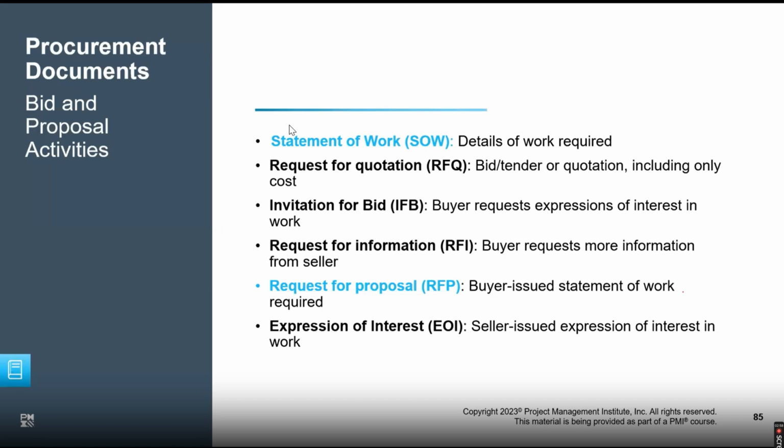MOU is to agree about the handover. Basically, whatever we have agreed before the legal stage, before you actually give a legal name, will be the MOU. Everything in the MOU will go into the contract. We both have a common understanding developed about the work, the pricing, the quality metrics, everything agreed upon. But I don't need the work right now. I'll let you know the moment we execute the contract, and your work will get started. So it's more of a common understanding.